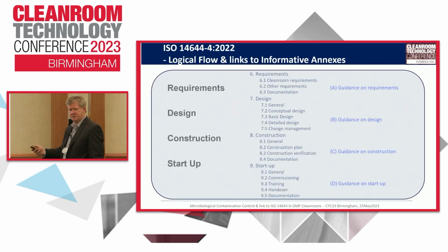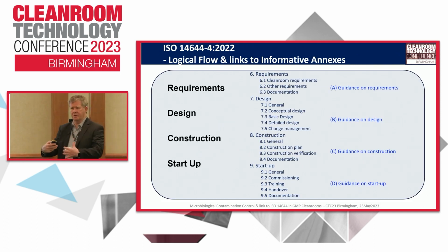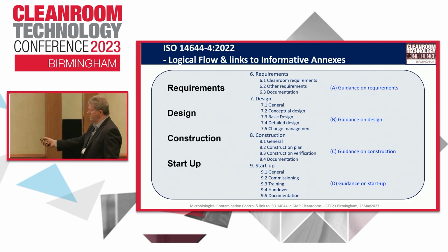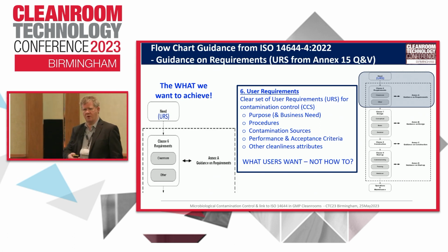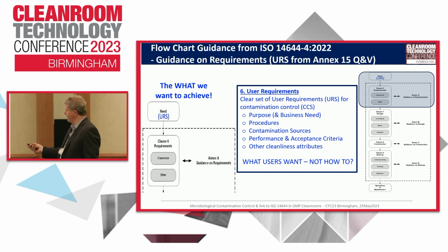I put this context together, so when you look at it, you'll see the totality of that, even though Steve has talked about it. Interesting in -4, I want to go through one item for you. User requirements. You should not tell somebody how many air change rates you want. You tell them what you're doing. You tell them how you're gowning.